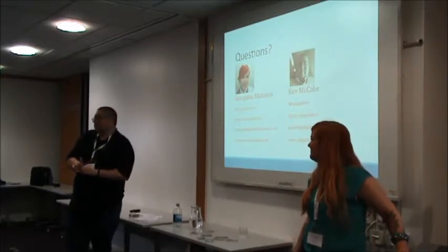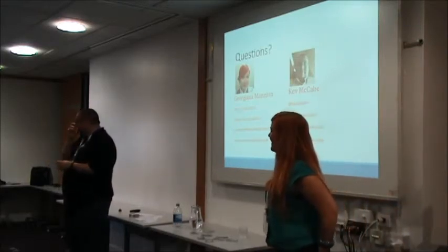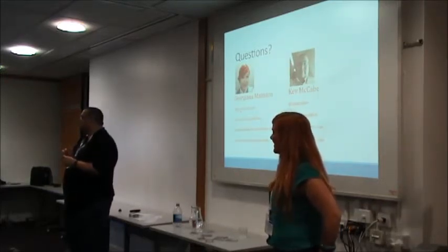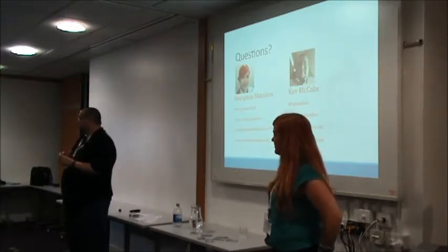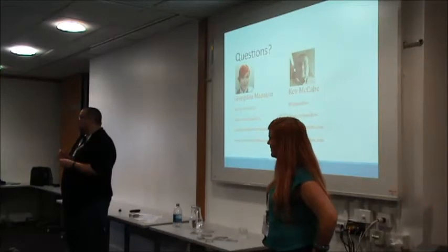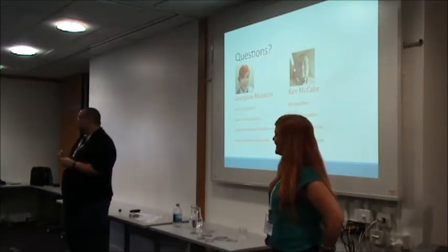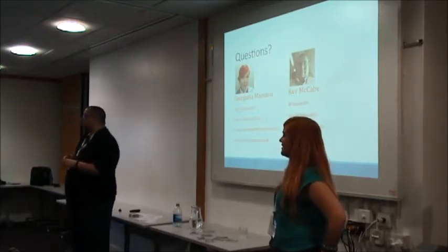Not so much a question, but sharing something around what you said about conflict. There was a team of about 10 at 9TV that did full-time pairing, so five pairs. They would rotate pairs every half a day, so they would constantly switch to different pieces of work for the knowledge share we talked about. But when they got to points where there was conflict, one of the pair would call a timeout, which would stop the entire team dead, and the team would have to decide what the conflict was and what the correct way forward would be.